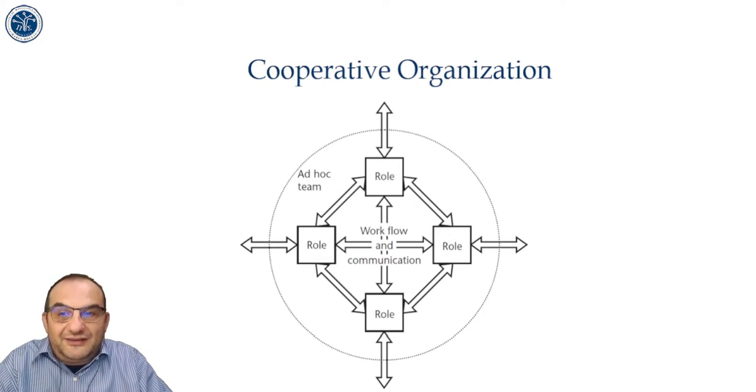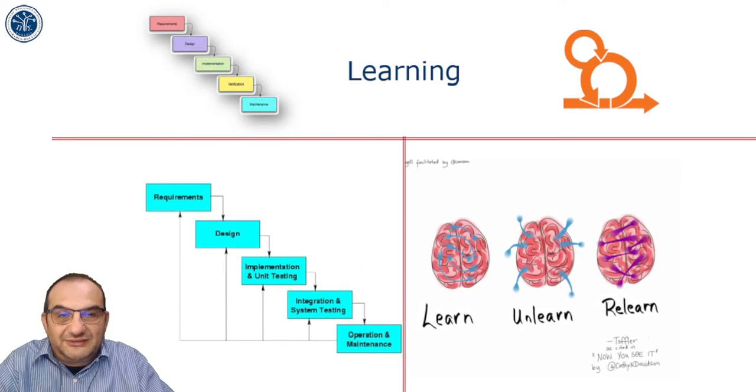Anyway, in order to have a performant self-organizing team, we have to be careful about the size of that team, to not have more than 9 people in that team. Otherwise, that communication will become chaotic. We already discussed this.